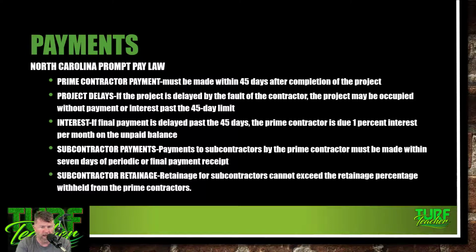So we've worked on many jobs where there have been multiple prime contractors. We actually work for the general contractor, though, who is one of the primes. And if the electrical is a large project, then the electrical contractor becomes a prime contractor, as well as the HVAC, especially on state jobs and working for colleges and public buildings. They're not going to want to have the GC oversee the electrical or HVAC because the cost gets too much. They don't want to add that builder's percentage to an already high percentage of the building cost.